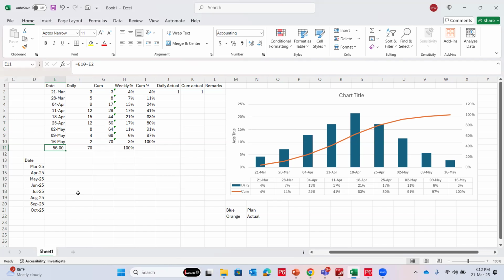So in that case, to cover ourselves, we can say that 80% will be complete by end of April. Only the remaining 20%, how many columns we have, like 10 to 15 columns, will be in May. So just to show them that it's not a disaster, because we're finishing most of the work in April itself. So these are the things you have to explain to them, because whatever you present, they will question you.